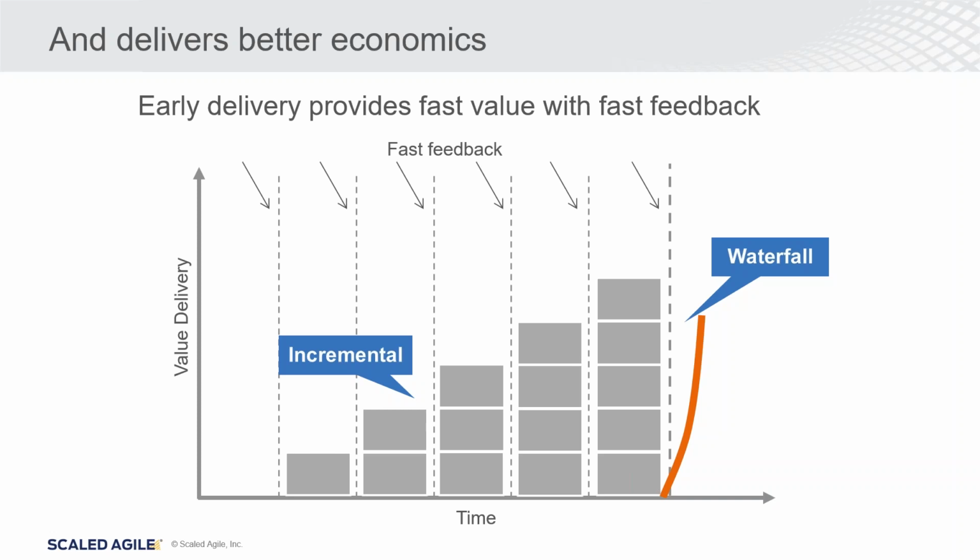What we're showing here is that we're providing value early on in the life cycle, and we're continually providing value over time. Whereas in the waterfall approach, the customer is not really getting any value until the very end, and then there may be a gap between what was anticipated and what was actually delivered.